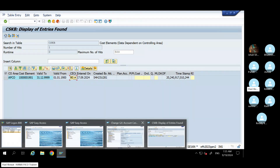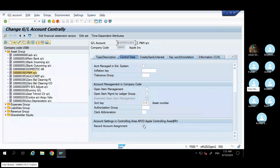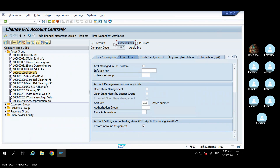This kind of cost element is known as a statistical cost element. It is generally required only for two kinds of GL: one for asset GL, and one for inventory or material GL. Because you do budgeting for both material and asset, you have to activate this only for material-related GL and asset-related GL.